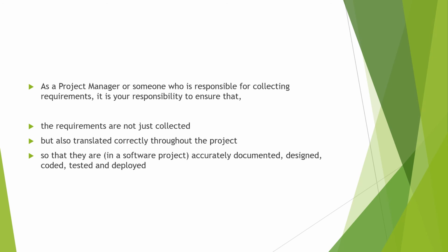So I'll give a very basic example. Let's say the requirement of the project is to make sure that the website or a software that you are creating processes 100 financial transactions in 1 minute. If that is a requirement, you need to make sure the designer designs the software in that fashion, so that the tool or the website or the software is able to process 100 transactions in 1 minute.